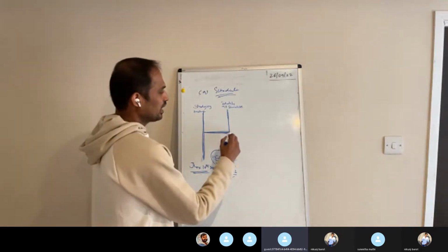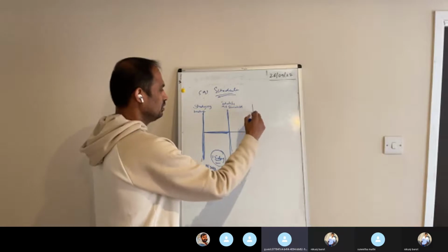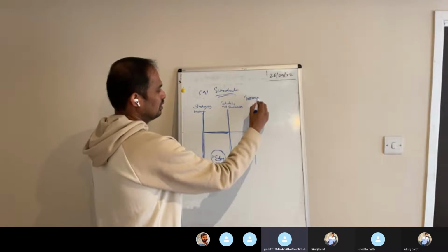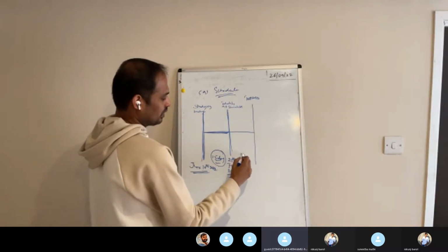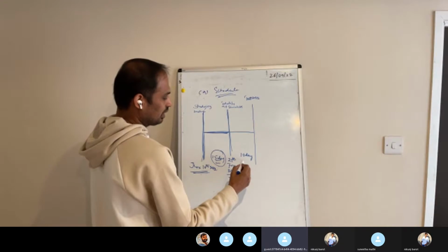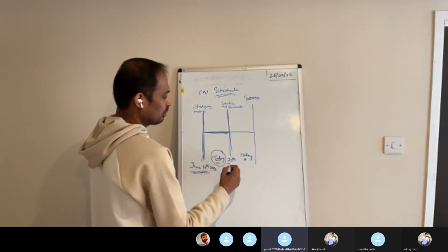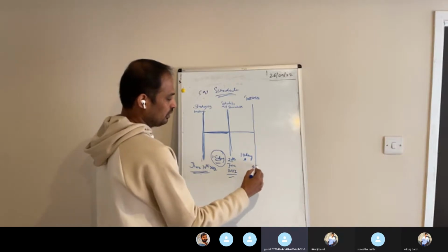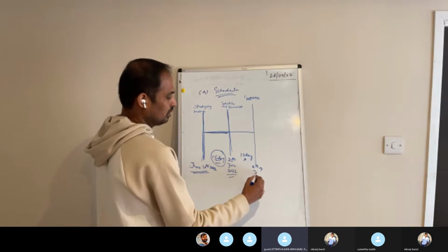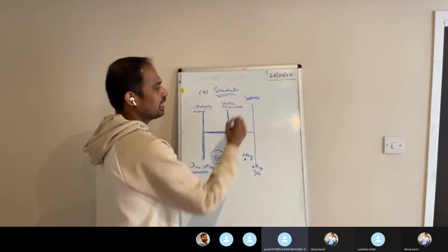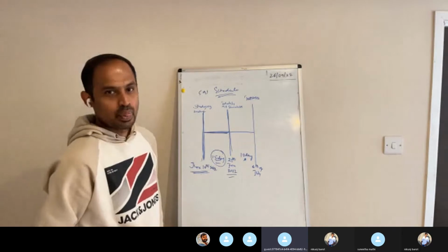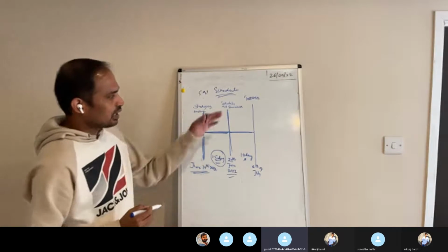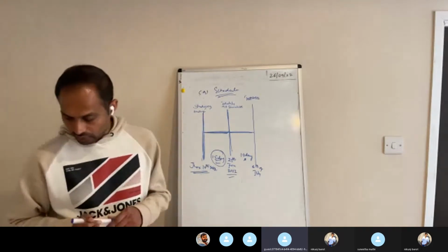Then after identifying the scenarios, we are going to write test cases. We have taken these 10 days to identify all the scenarios, from 25th June. After 10 days it will be around 6th of July. From 6th of July, we start writing the test cases. After writing the test cases, what are we going to do?